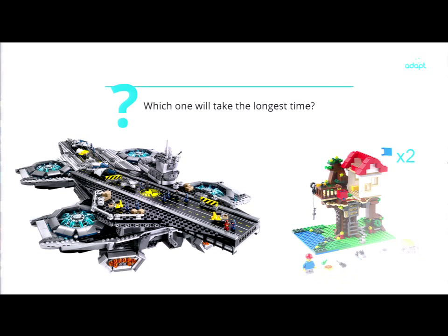And my next question is, if you can only say on a scale, is this twice the time, four times, eight times, 16, or 32 times, then you actually might have an idea on where on the scale we are, and that's all we want to know. Because we don't have more information right now, but now we have some idea on how complex these two are compared to each other.